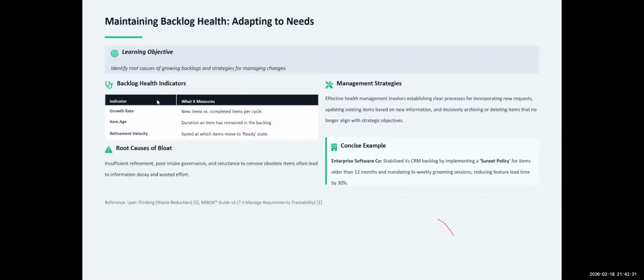Just tell the PO, if we have an item here in the backlog for a year plus, then it means that either there is no business exigency for it, or technology has moved on, the business has moved on, the market has moved on. Then it's not required. We don't need to be keeping it there, right? So that's to answer that question.